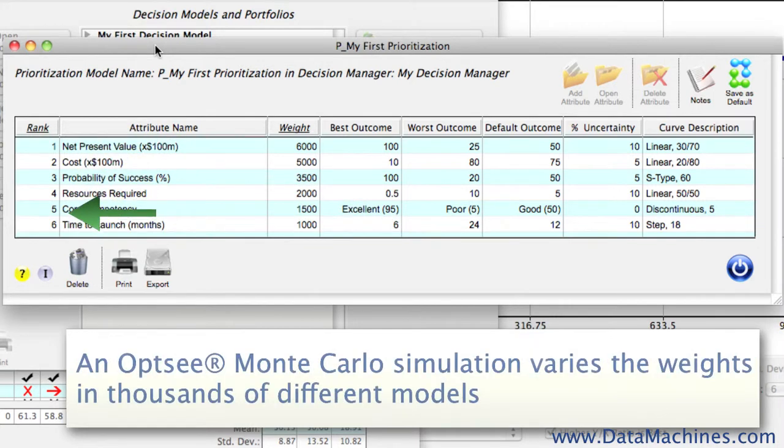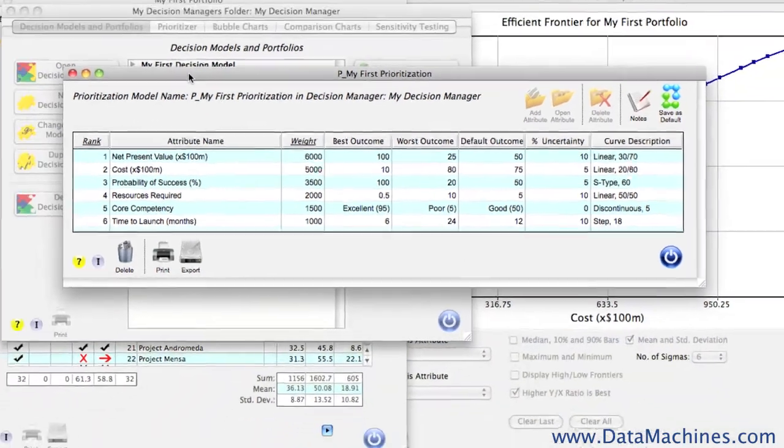What OPSEE does is take this discussion from specific weights to just ranking the attributes in order of importance, and then letting the Monte Carlo simulation vary the attribute weights in thousands of tests to give a distribution of value scores based on the outcomes of thousands of different models. It's kind of like doing a massive sensitivity test, but instead of just varying one attribute at a time, you're varying all of them at once.